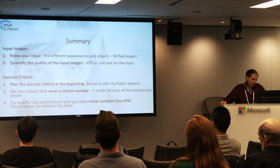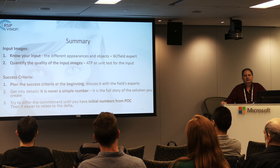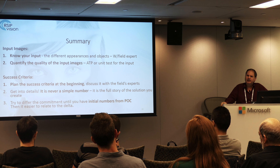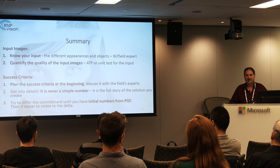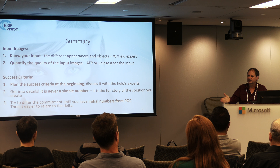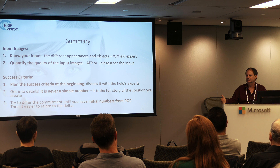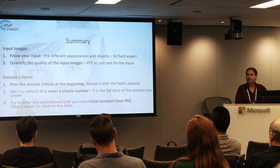About success criteria: we must plan them at the beginning so all engineers are aware, and understand that it is not just one number — there are different cases to relate to. If we can defer the commitment to a specific number until we have a proof of concept or initial software, that is much better. Then we can relate to the delta — for example, if after one or two months we get initial results at 90%, we can say the remaining problems are X, Y, Z, solving them will take this effort, and it will lead us to 95%. That is a much better way to work.